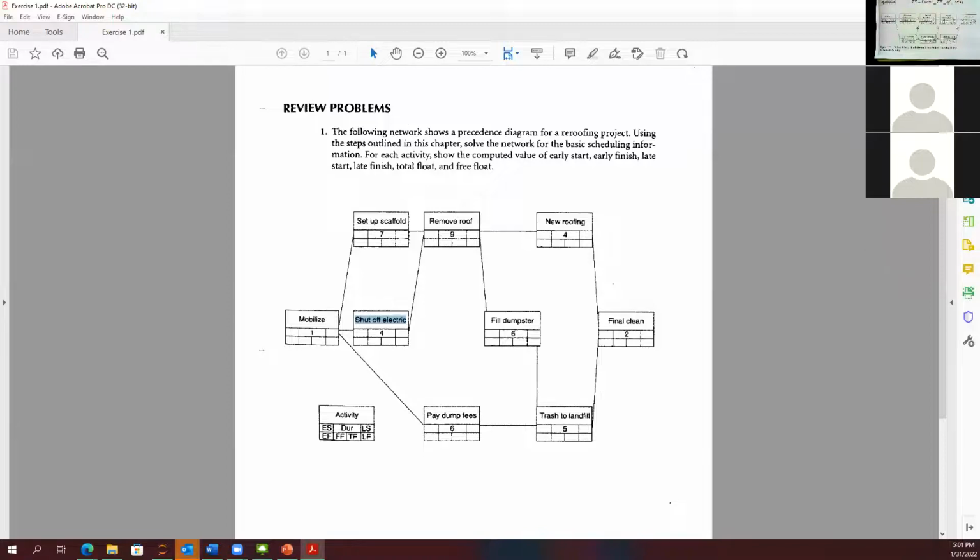Okay, so I think a critical path 16 days. What do you mean? No, the critical path shouldn't be 16 days. You calculate the total duration of the project is finish on day 31, so the total duration is 30 days.